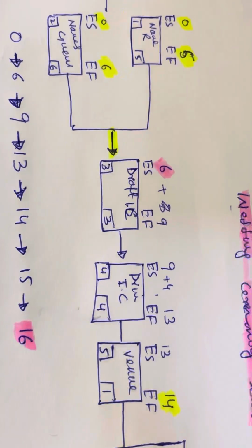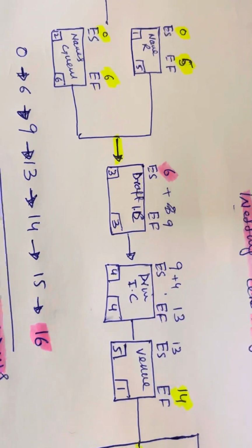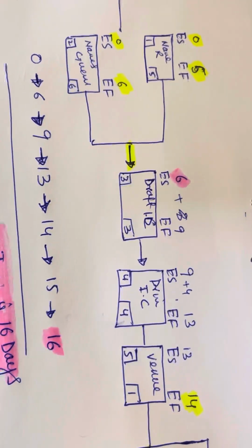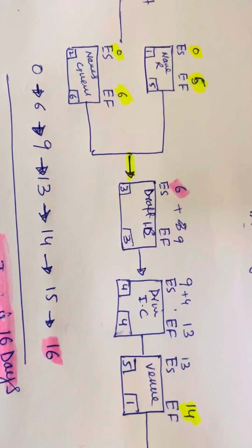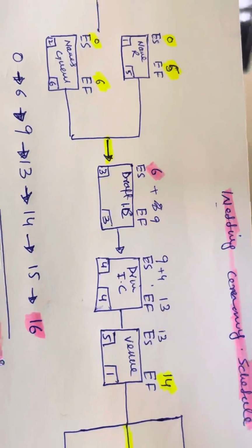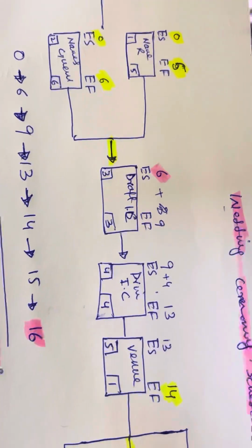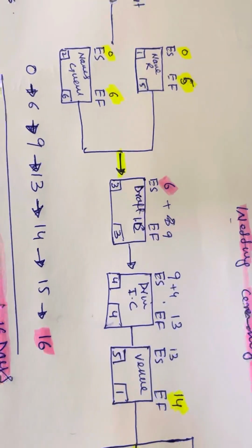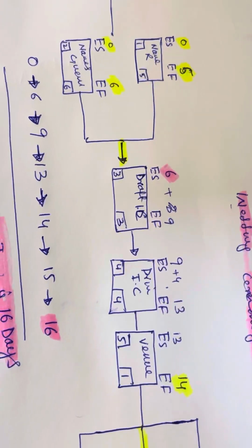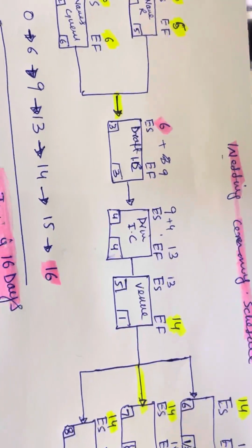Then when we check it and the draft and everything is correct, we give all these to the printing to print the invitation card. So the earliest start for this is day 9, and its duration is 4 days. Because of preparation, you are putting a name on every invitation card. So 9 plus 4 is equal to 13.